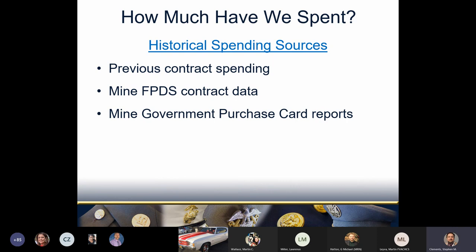I encourage you to ask around because co-workers might have contracts of interest to share. I also search FPDS, which can show those contracts and their numbers for mining good ideas from previous packages. If you have a friendly supply system analyst nearby, ask them to run a GPC report — mine helped me get a more complete picture of WISNICK purchasing. Also, if your customer is using GPCs to buy items on a known repetitive basis, per the purchase card manuals you're supposed to make a contract to cover that need. Are there other places you look for historical spending information? Please drop them in the chat.